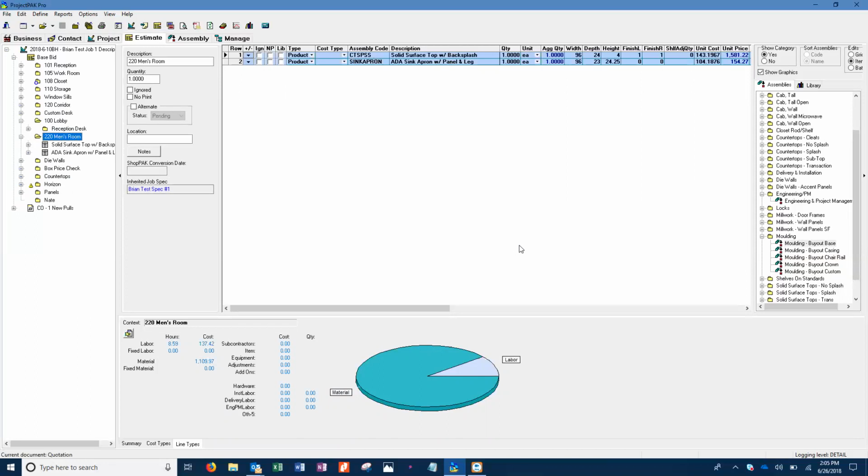I lost my train of thought. So when you just change part of the job spec, the original job spec stays there and just changes that part? So here's the thing. If you put in a big job spec and you change all kinds of stuff, the melamine, the laminate, the pull, the slide, whether it's wood or not, and it inherits all the way down like this. And then it comes a time where you think, okay, I need to change this one completely differently. You want to be careful, because if you don't change every attribute that you changed before, then the original attributes are going to stay in play.